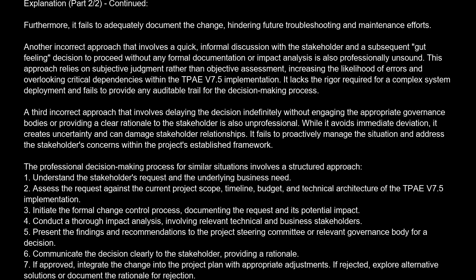6. Communicate the decision clearly to the stakeholder, providing a rationale. 7. If approved, integrate the change into the project plan with appropriate adjustments. If rejected, explore alternative solutions or document the rationale for rejection.